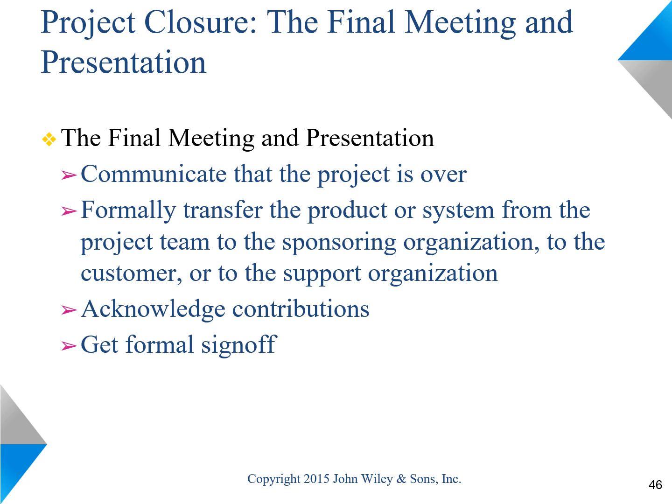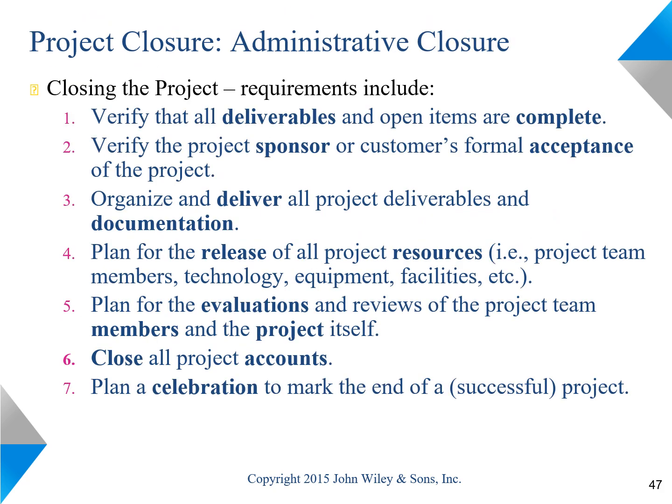You acknowledge the contribution of everybody involved, including the receiving organization staff and key project members, and get a formal sign-off on the project, and typically also celebrate. This is another good list of things that are part of the administrative closure that need to be documented and put in place.